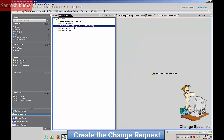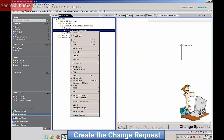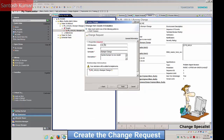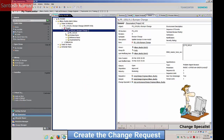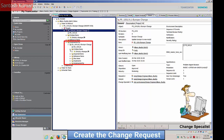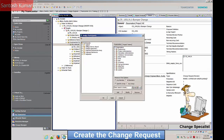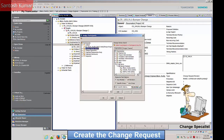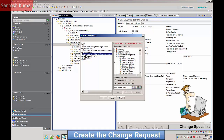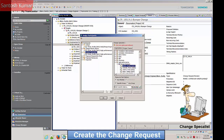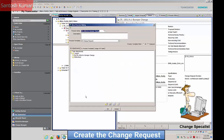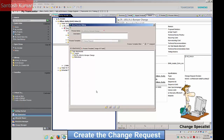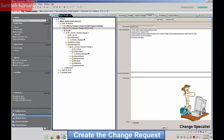The task to create the change request appears in the change specialist's work list. The change request is derived from the problem report, and information such as impacted parts are copied or propagated into the change request. The problem report shows that it has been implemented by the new change request. The change request is now ready to be actioned by the change request workflow process. The create engineering change request task is now complete and signed off.